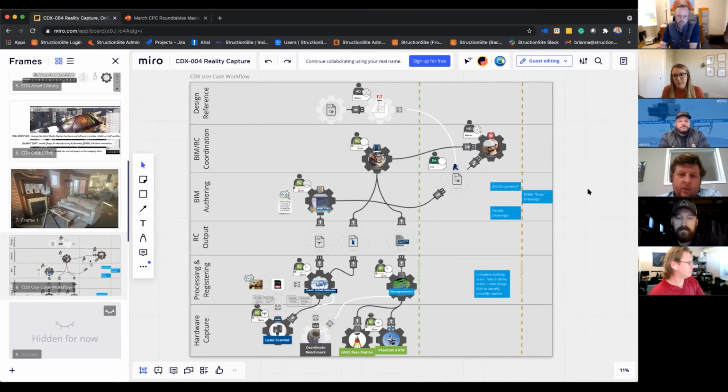Definitely. One thing is how can we open this up for jurisdictions to have input, or open these files up as more jurisdictions come online with BIM or reviewing models? How can we incorporate them to give checks and balances throughout the process, to make sure that we're not going down a design road, planning the thing, then they come and say, hang on, you can't do this. So incorporating AHJs and historic preservation offices during the process, I think we need to have some form of communication checkpoint to make sure we're not getting too far ahead of jurisdictions that are still